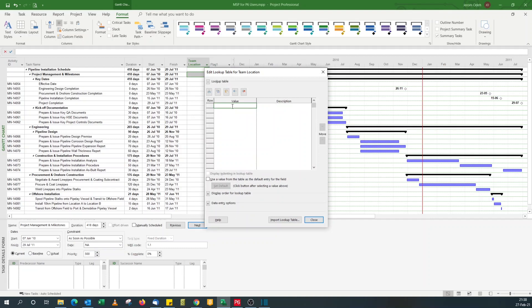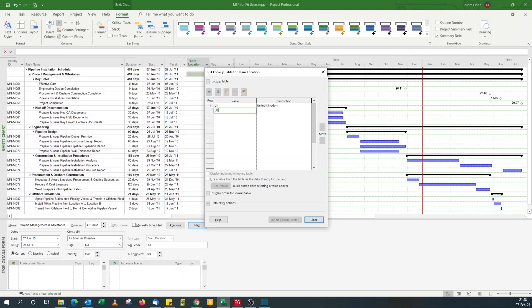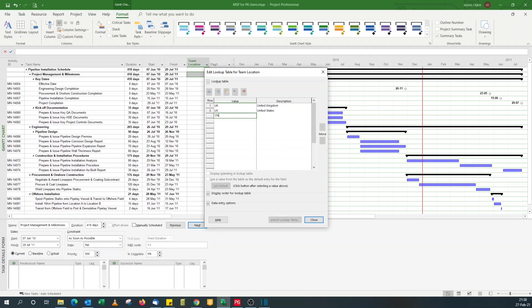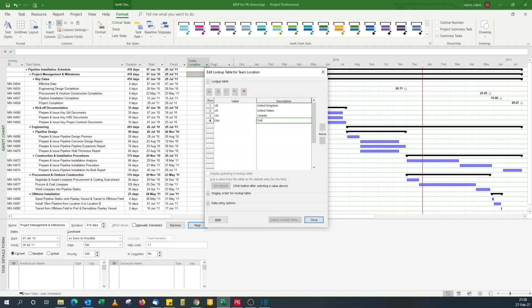And to assign values to a code in Microsoft Project under custom attributes, you click lookup. So here I'll enter my values: I've got UK United Kingdom, US United States, CN Canada, and OM for Oman.